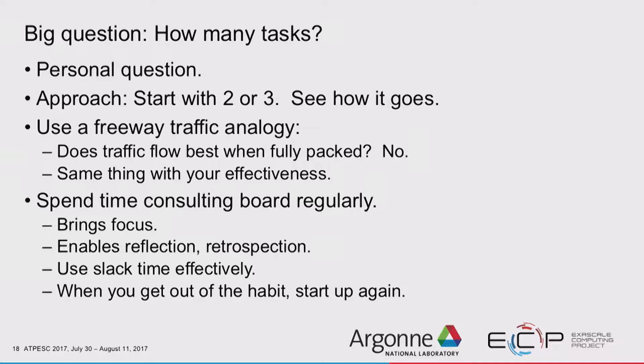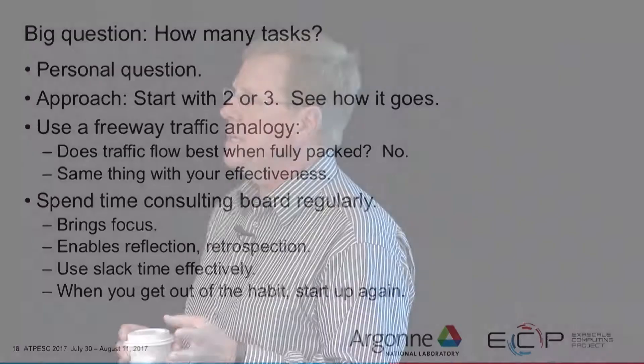I also use an in-review column for things I've completed and want someone else to look at. I slide an item from in-progress to in-review and send a note to somebody asking them to look at it. That way I don't drop it — it's not missing — and then they can get back to me.